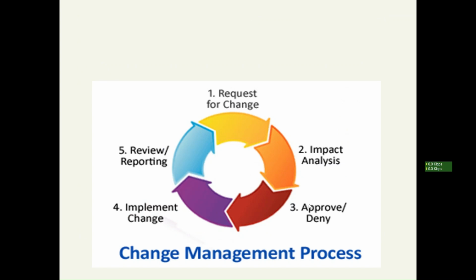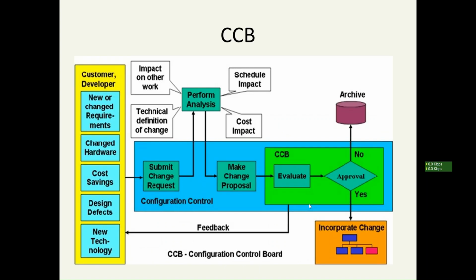Okay, hope you learned something out of this. So when a customer is asking for a change, it's called a change request. When a change request is raised, it goes to the CCB. The CCB will do impact analysis. Impact analysis means how far this change is affecting our project. As I told you, CCB means change control board. They will do impact analysis: impact on the other work, technical definition of the work, cost, and schedule.